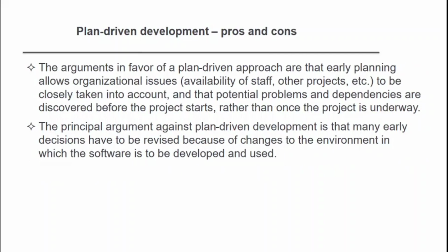Arguments in favor of the plan-driven approach are that early planning allows the organization issues to be resolved. That is, if you plan early, before development of the project, then they will resolve some of the issues. What are the issues? One is availability of the staff, other projects, etc., to be closely taken into account, and potential problems and dependencies are discovered before the project starts rather than once the project is underway.